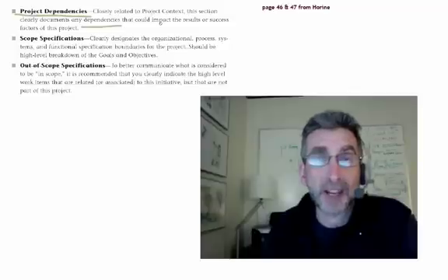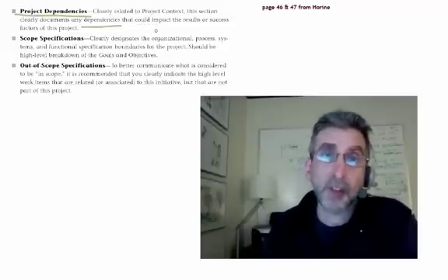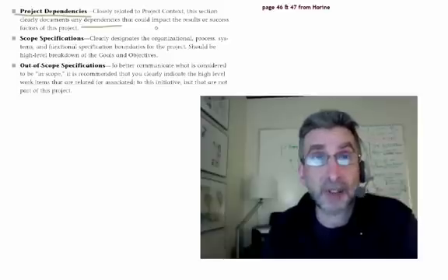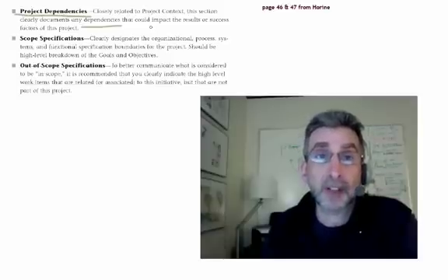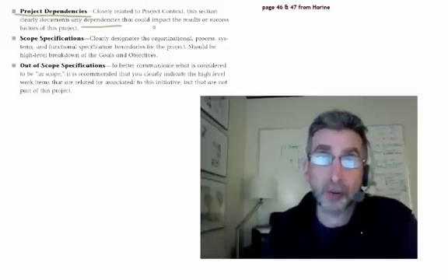You might be depending on doing videotaping outside, and the weather better be good. And once again, that becomes a risk, because if it rains a lot and you can't get outside, your dependence on being outside affects the whole project. And once again, this is just a list.